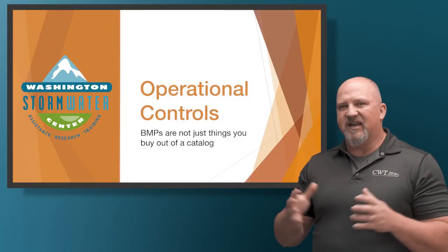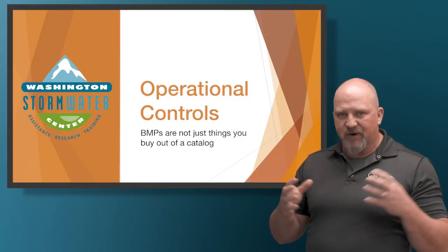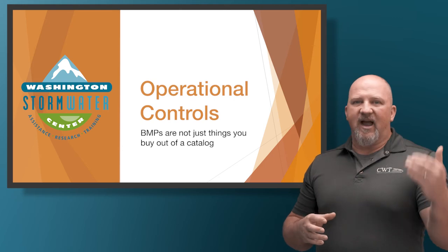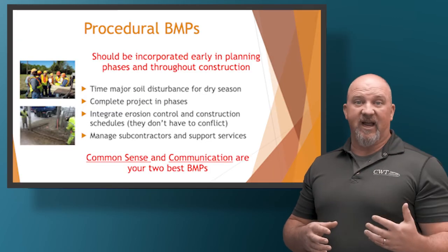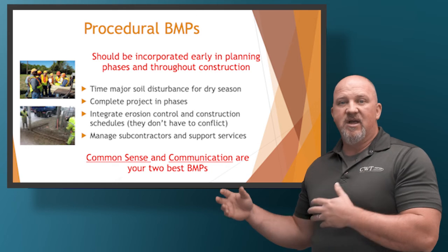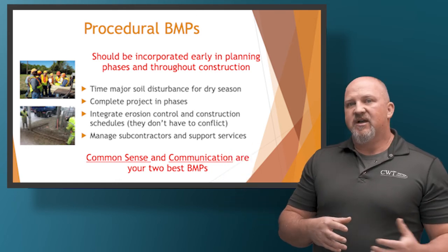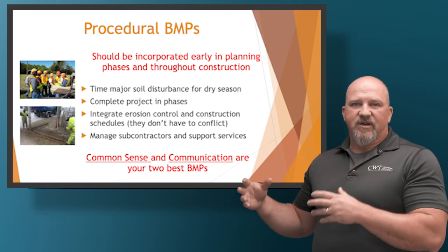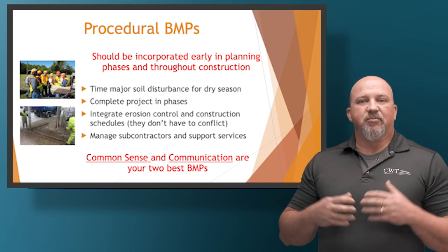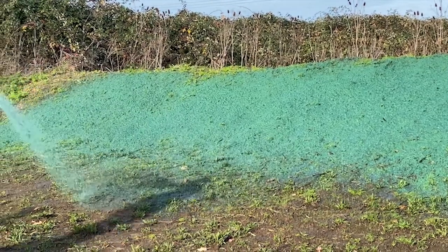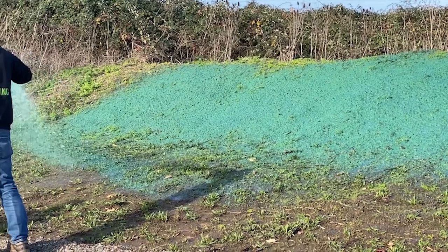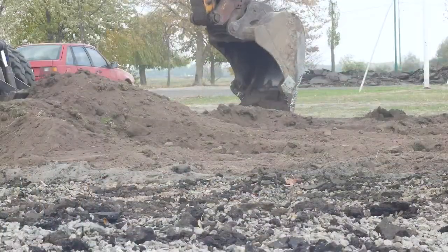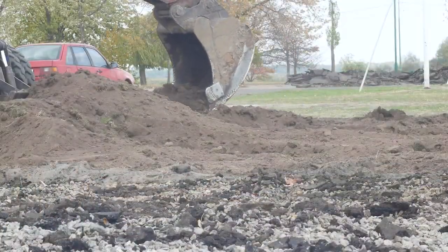Use that common sense and communication BMP to your advantage. Think about the timing of things, integrate your construction activities so that erosion and sediment control don't conflict with each other. You don't want to have the focuses so disconnected that you're spraying a slope with hydromulch and then the superintendent or manager of the project says, how do we get into that tomorrow?